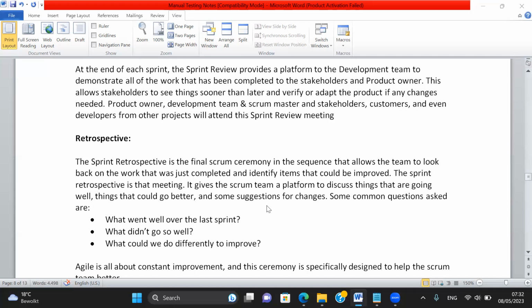So now Ashwini will tell what went well, what did not go well in this sprint, and what improvements we can make. So the Scrum Master is taking feedback from each and every individual so that they can follow best practices in upcoming sprints. If they tell us, we have made this mistake, so we should not repeat it again, then the Scrum Master will note down that this is the difficulty which we faced. This is the mistake which we made, which we should not repeat in the upcoming sprints.